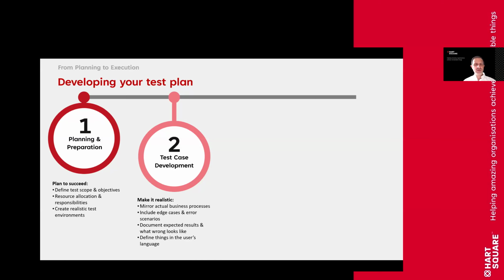Document expected results, what good looks like, what doesn't, and what wrong looks like as well. And help define things in the user's language. Far too often test scripts are written from a very technical perspective, which makes it very difficult for a non-technical user to understand. So when you're writing your test scripts or your test cases, I would encourage writing them from the end user's perspective so that they are easy to understand and easy to follow.